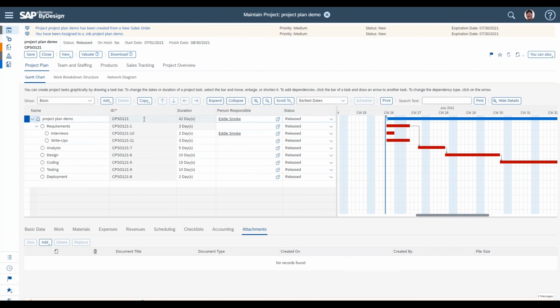And so what that means is as soon as we put the project into released, it's going to propagate that status down across all of the tasks. And that's a good thing. So we want to start releasing for execution. The in-planning status, once we've done that, you'll see we can no longer go back to an in-planning status. So really, once you take your project from in-planning to either started or released, your project codes are locked in, and essentially you're on a go-forward basis, and you have new statuses now to control the life cycle of the project or individual